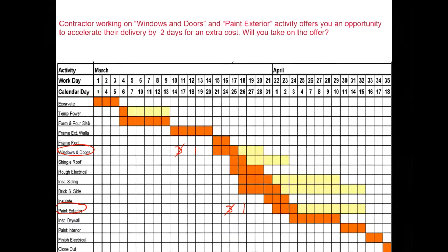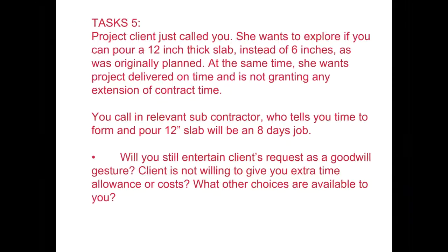There is no point in accelerating non-critical activities. So you can look at which are my critical activities. You can highlight and maybe speak to those subcontractors which are following the delayed activity, because the only way for you to get back on track to recover the 2 days lost is to attack a critical activity. Crashing a non-critical activity will not bring any advantage.